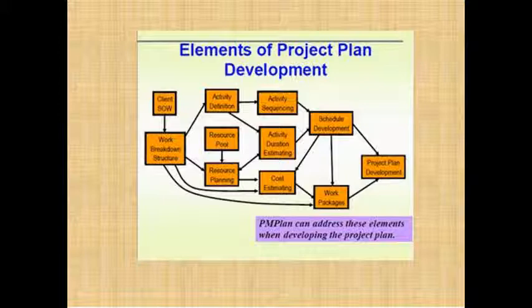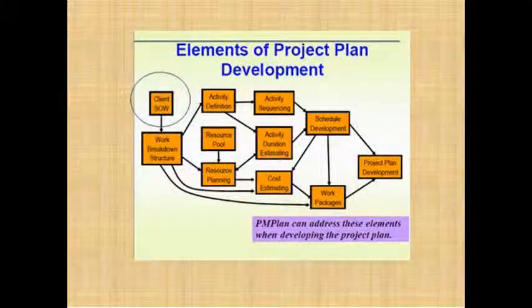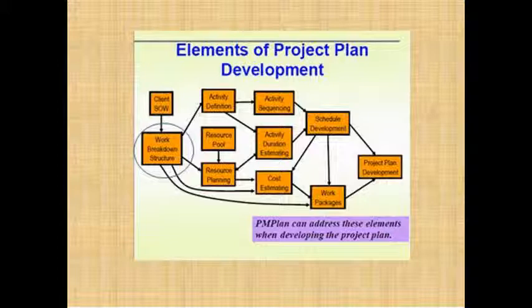Now, in this slide, it is shown that the plan development starts with a statement of work. Okay, and this will lead to a work breakdown structure from which all activities will be defined and from which the resources will have to be identified. Okay. And this will lead to the estimated activity durations so that a schedule will follow. Alongside with it will be the cost that will be estimated for each activity so that it can come up with a budget, and that will comprise the project plan.